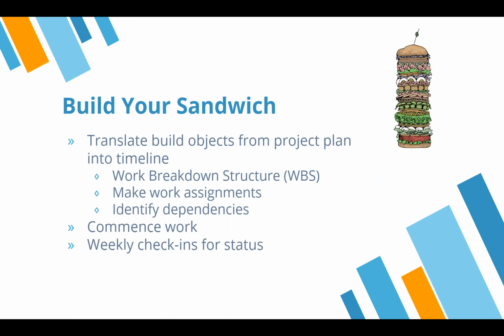So the things that you have to create or build for this effort should be identified, and oftentimes it's called a work breakdown structure. Essentially, it's a nice task list. And again, you do not have to make this fancy. It can be in Word, it can be in Excel, it can be in Project if you want it to be. But again, all you're trying to do is show everybody, here's all the things that have to happen. Now, you can get super granular, but it probably isn't necessary.